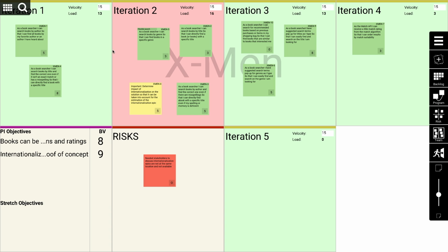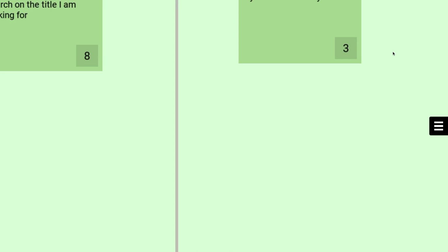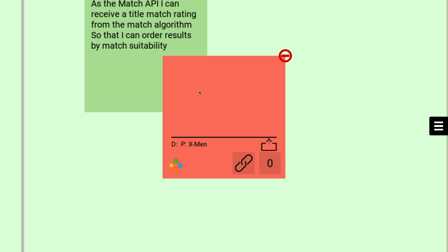In this video, I will show you how you can solve a dependency. If one team detects a dependency to another team, optimally, the Scrum Master reaches out to the other teams to find the team the dependency belongs to or the team that will do the work required. In a collocated environment, he will walk around and look out for the team. In a distributed setting, he will contact different Scrum Masters over the used video conferencing service.